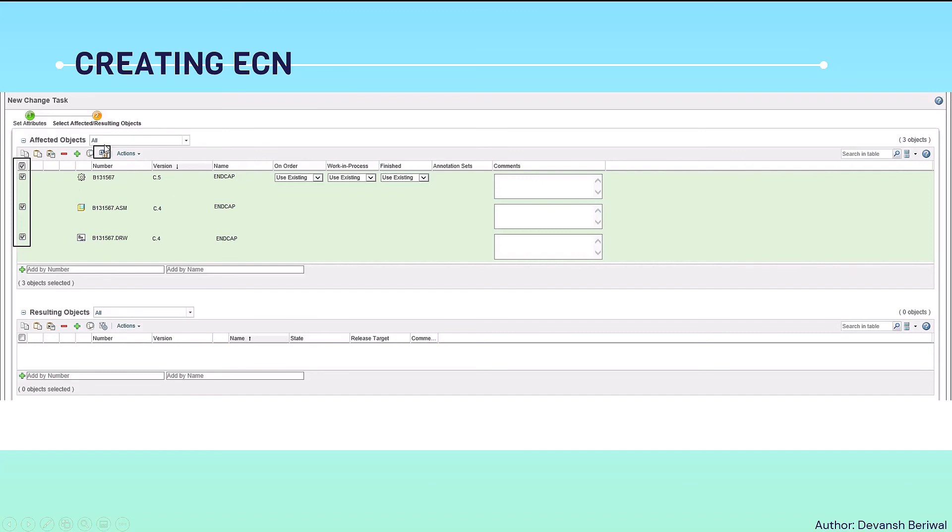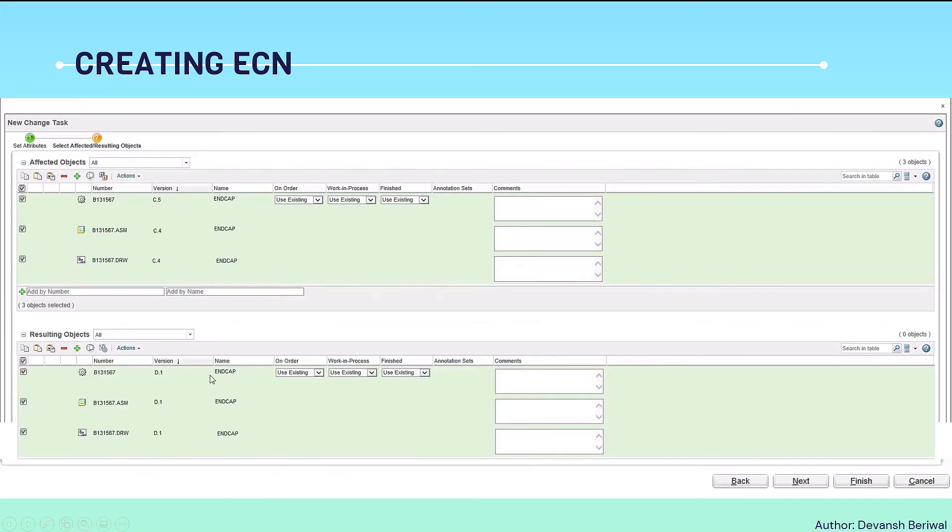This revision is necessary because we cannot change anything in the C revision because it is already in the production state. We need a revision so that the part comes into in-work and we can work on that. Like this, all the parts will be there. In both the tables there should be parts affected and resulting objects. Then only click on finish.